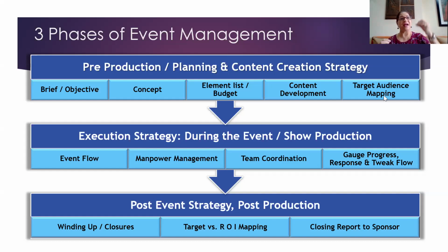Whatever advertising you've done, whether radio spots, hoardings, or print ads, all of that has to be collected and pasted onto a nice page, and you get these ready-made folders and make your report on that. On such-and-such date, such-and-such ad came in, and so many tickets got sold with this ad. This gives the client an idea of how we moved, where we went wrong or right, and whether we should repeat the same.